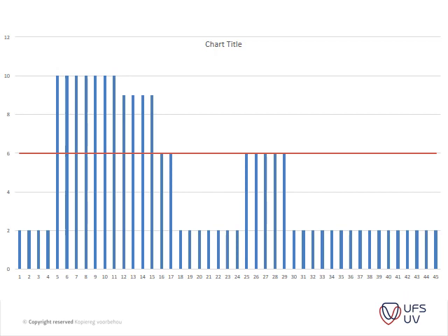Now the example continues to indicate the maximum amount. The problem with the contractor is that he only has 6 joiners available to work on this project. If the project completion date is not to be extended, the only solution to the problem is to level the labor demand within the program according to the number of joiners available. This means adjusting the work activities within the available float, but obviously not the critical ones, to reduce the peak labor demand.